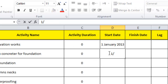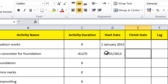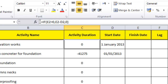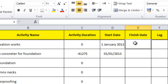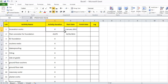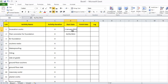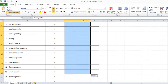Let's say I put 1st January 2013 as the start — this is exactly what I was talking about. Without the IF formula, Excel calculates finish minus start immediately and gives a wrong duration. With the conditional formula, if the finish cell is greater than zero, it proceeds; otherwise it stays zero. I'll double-click to apply this formula to all rows, then copy the date format and paste it everywhere.